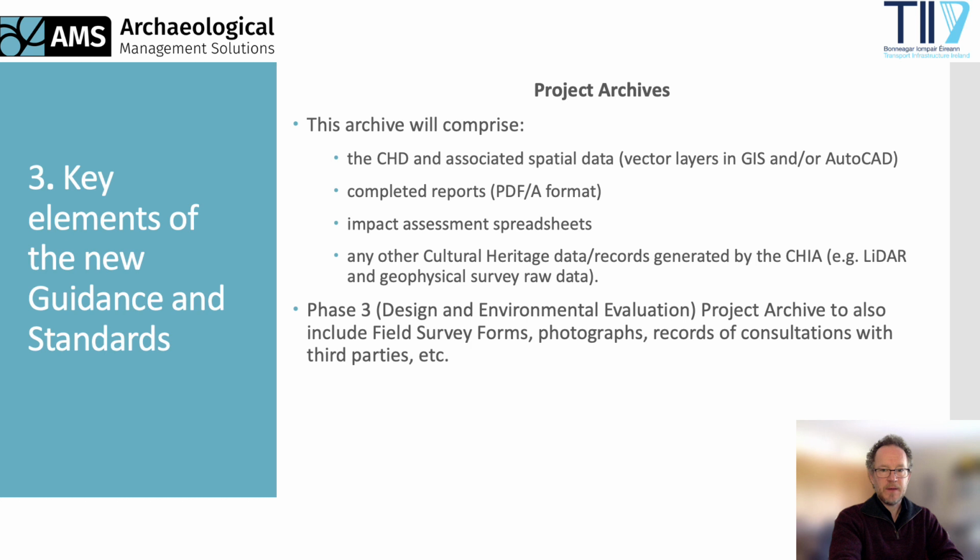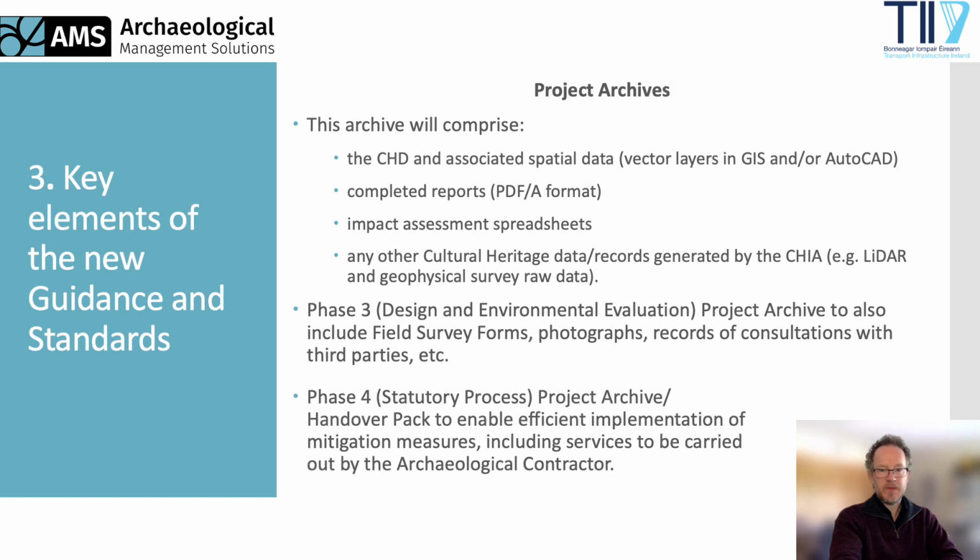At Phase 3, field survey forms and other records are added into the project archive, along with photographs and any consultations with third parties. This is very important, as such documentation may be needed to support evidence presented at oral hearing. Similarly, the project archive produced at Phase 4 is in effect a handover pack to enable efficient implementation of mitigation measures, including the services to be carried out by the archaeological contractor post-consent.